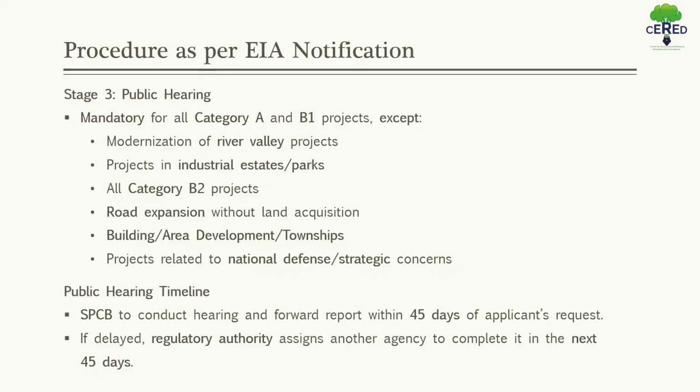With wide publicity, the draft EIA report shall be placed at the notified place during the normal office hours. That is what happens in public hearing: all the responses received from the public shall be forwarded to the applicant through the quickest possible means. And after compliance of public consultation, the applicant shall make appropriate changes in the draft EIA or EMP report, and the final EIA report shall be submitted to the regulatory authority.